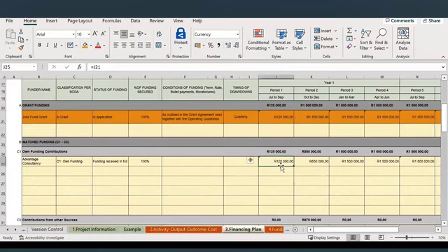If you're borrowing money from an institution, this will ring closer to home, because you're not going to draw down funds that you're going to be paying interest on. So ideally, draw the funds down based on what you require. Here we've only requested 125,000 for the grant and 125,000 in match funding.